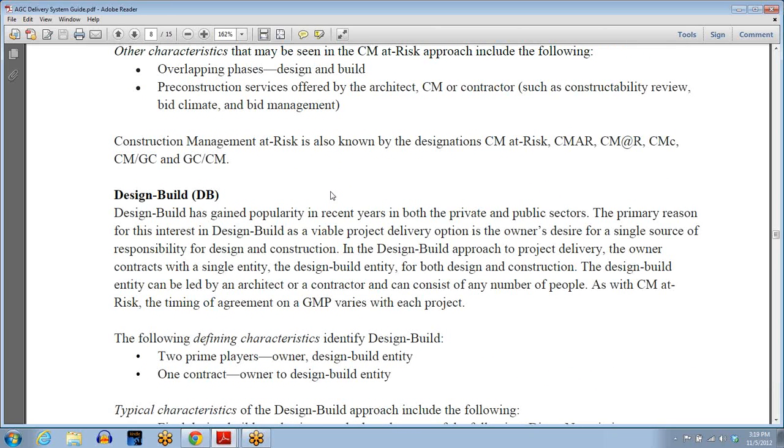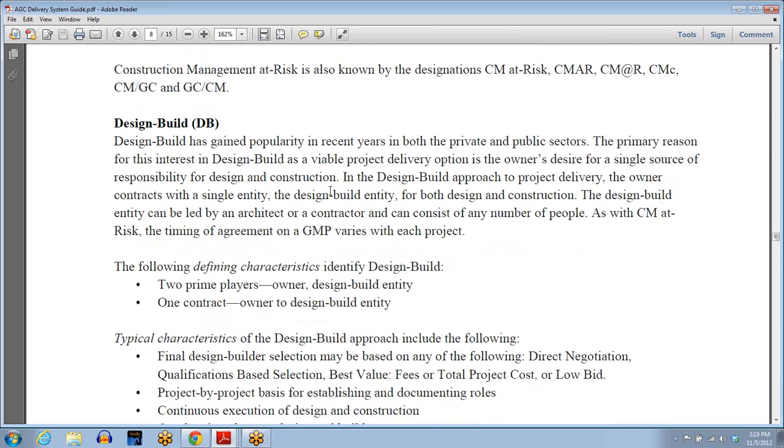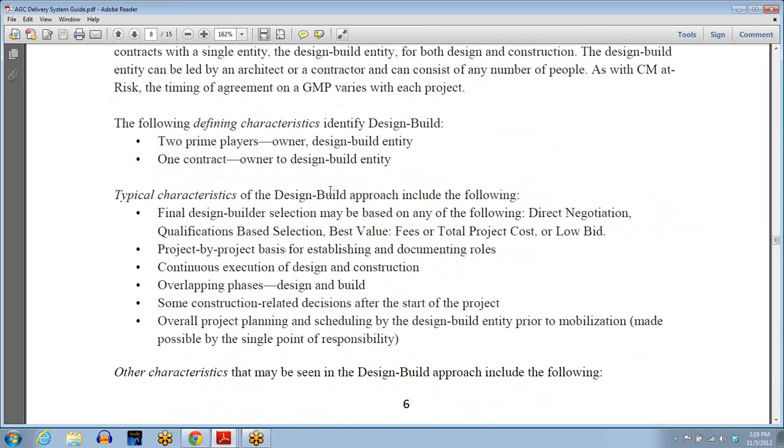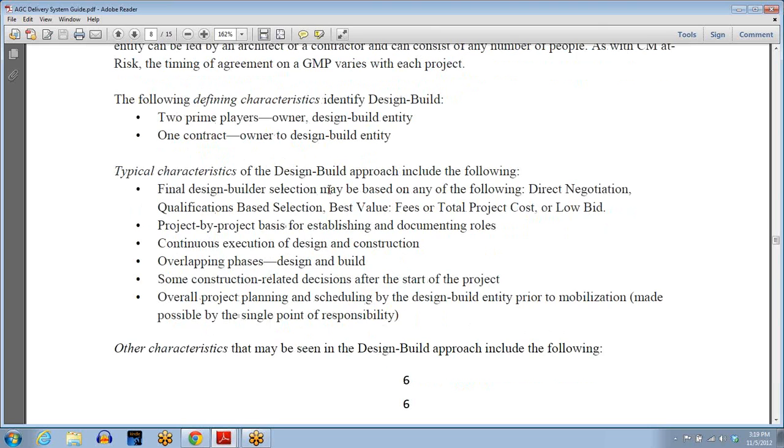They don't say anything about pure agency, which has great benefits to it, as do all of these, and some negatives. Nor do they deal with fourth party, where you've got the church, the designer, the builder, and the construction management fourth party who's working on behalf of the church to work with the builder and the architect, so as to give the church some professional representation with the designer and the builder.